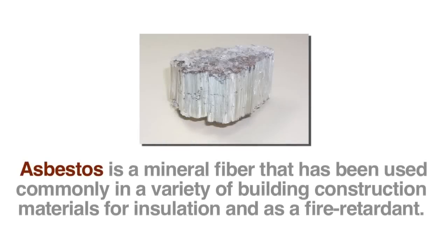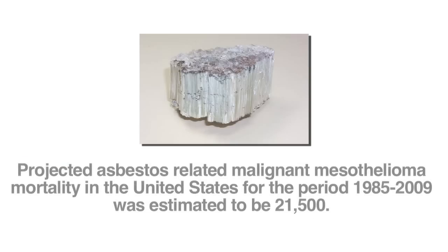Right. The Environmental Protection Agency, as well as the state of California, makes it mandatory to test certain building materials before they are disturbed. This is the case with many different kinds of construction projects and renovation projects. Asbestos is a naturally occurring mineral that was mined and used heavily between the 1930s and the 1980s. It's also a known carcinogen and is responsible for huge death tolls in the United States alone. That's why it's regulated.